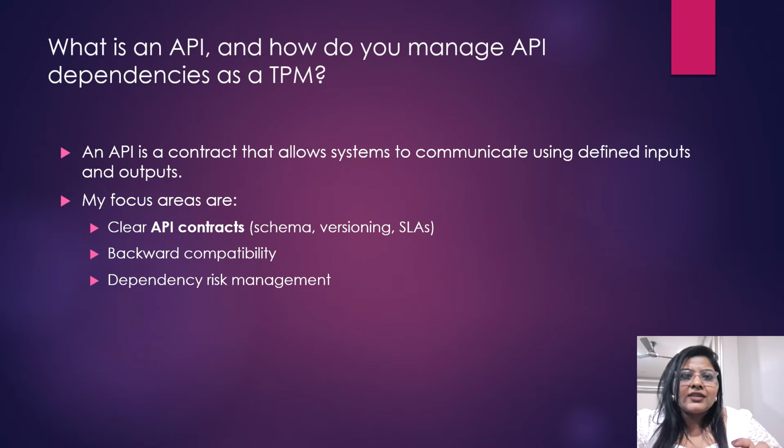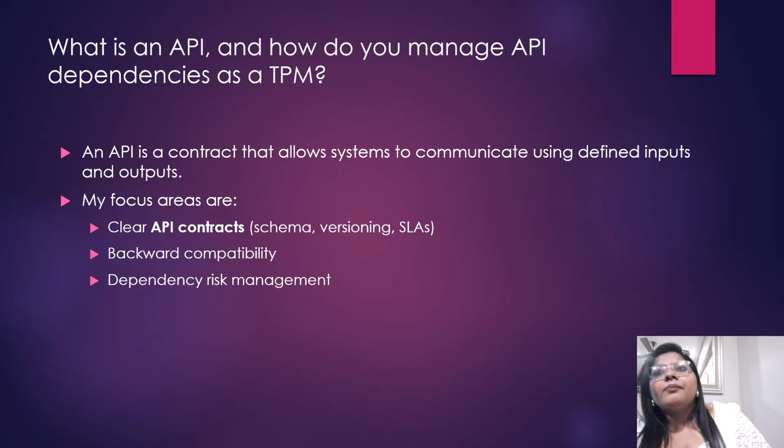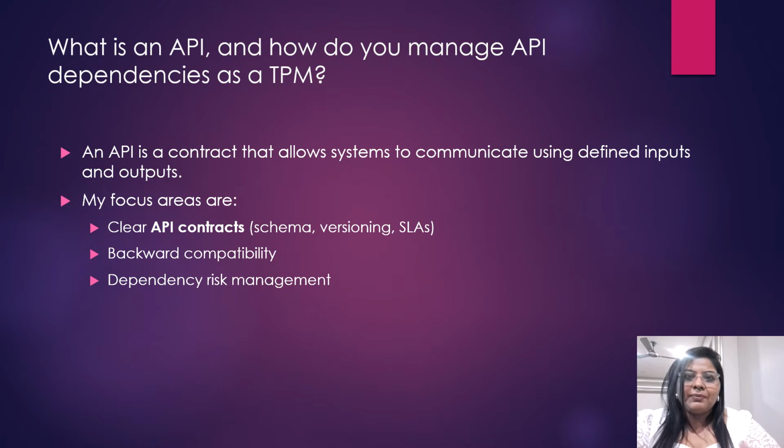The next is dependency and risk management. So which team is delivering when? That is most important. Let's say both teams have the same deadline to production, to UAT, right? But team A is dependent on team B, and team B is going to take 6 weeks to build an API. So what we provision is we ensure that mock APIs are available early, so that team A can also start the work. Then, what changes require versioning? There should not be breaking updates.